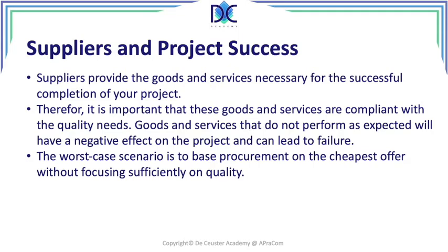It creates a lot of problems because they go under the price, and somebody told me in many construction projects, the people supply a price for the project, but they also count on additional work because there will be issues in the project. So they go below their cost, but they want to compensate later by additional spending to resolve issues in the project. It's very important that you have good suppliers and that the selection criteria will give you the possibility to have a successful project.